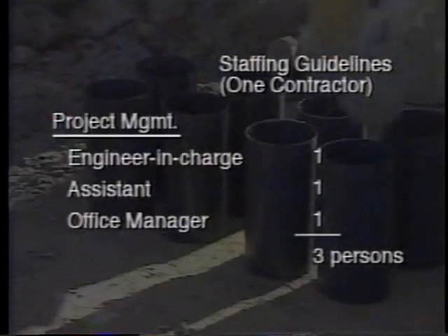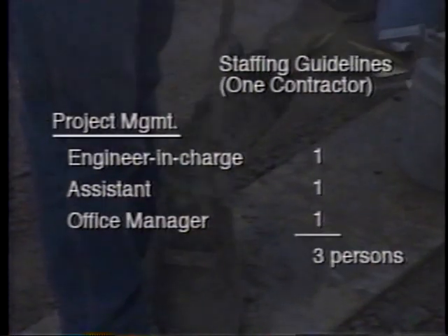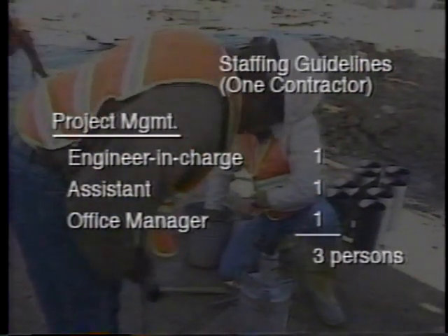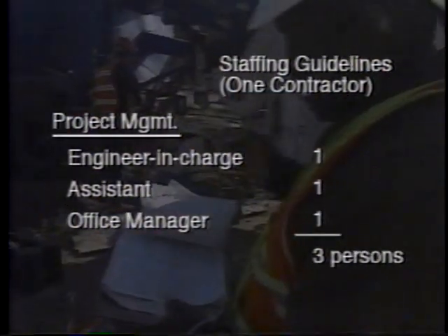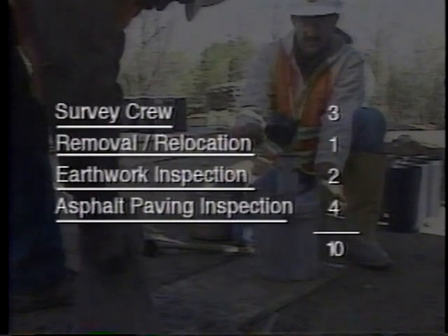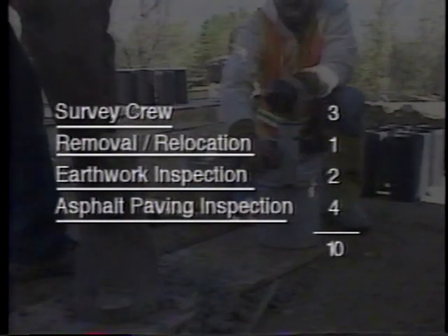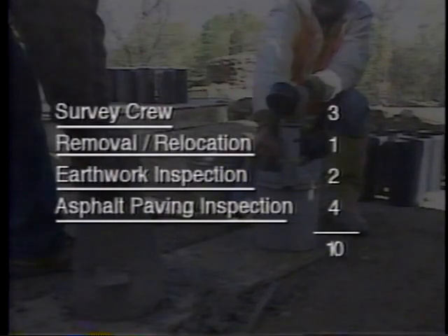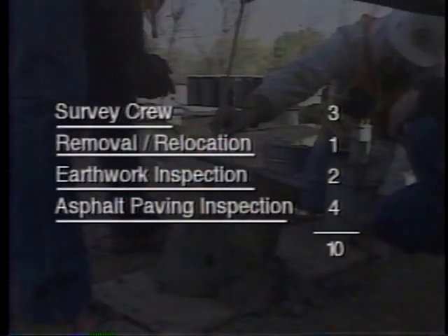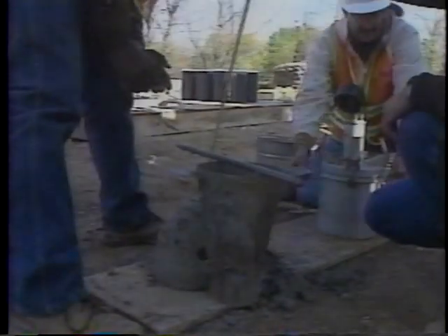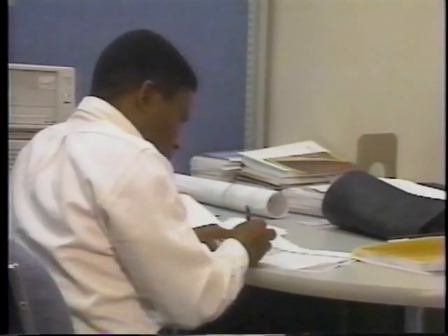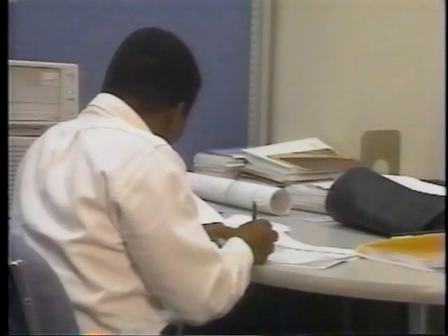Maximum staffing guidelines show the maximum number of personnel that should normally be assigned for each operation on major contracts. The guidelines are for peak operations. The number of personnel would be less for minor contracts, and at other times when the contractor's productivity requires only part-time inspection. Each agency should modify the maximum staffing guidelines to fit its own work methods.